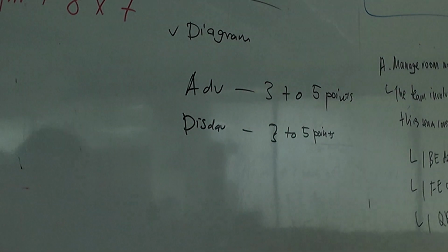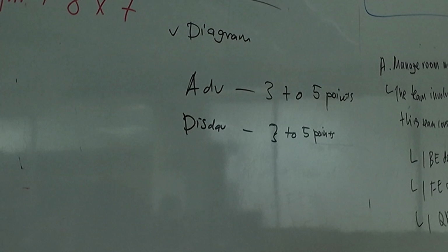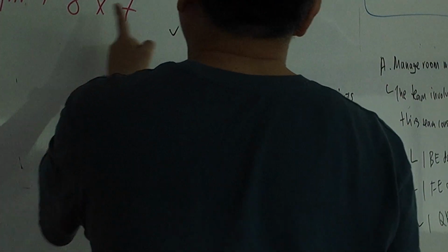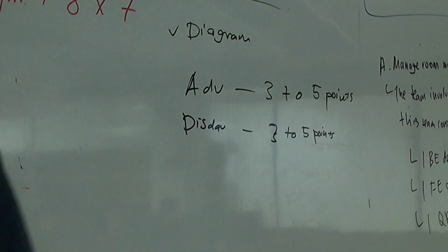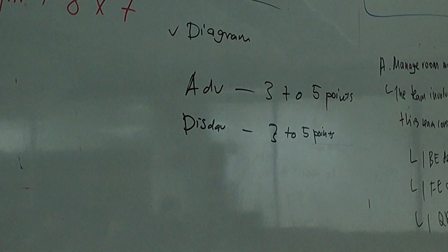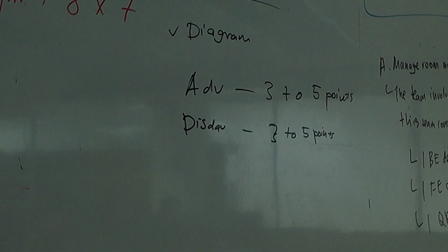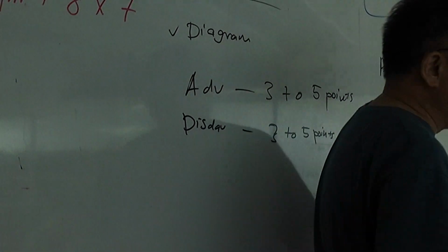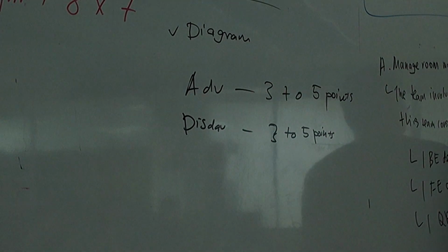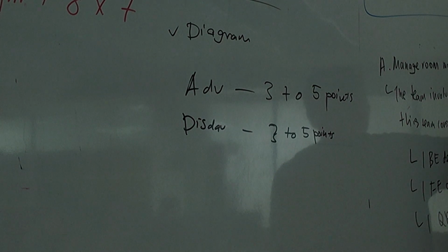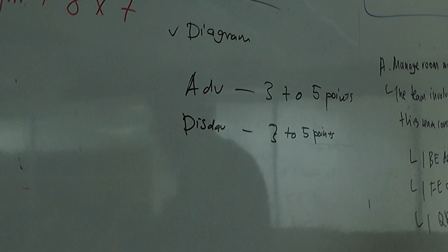Okay? So let's try. So let's say meet users, I'm now rendering efficient. I don't think I will need 7 days like my planning. I think I will need only 5 days. So if you change this to 5 days, you see the 2008 change to $2,000. Because now it becomes 50 times 8 times 5, which is 2,000. Got it? So it's actually quite straightforward once you know how it works already, right? So you do this for every line item that you have. Okay? So you can assign people to it as well as items which require cost to it as well. So you assign them to do that.